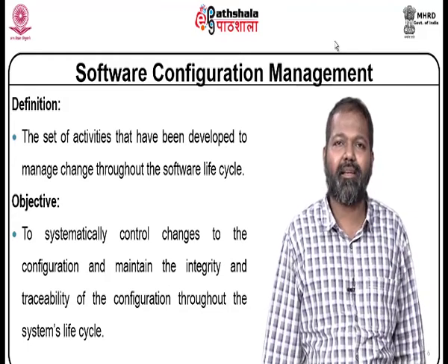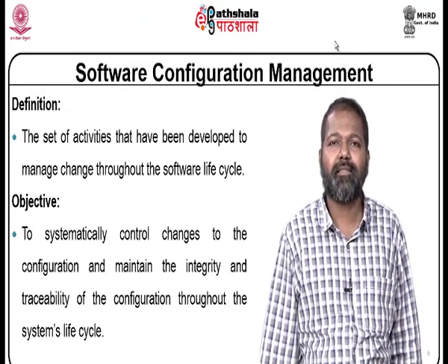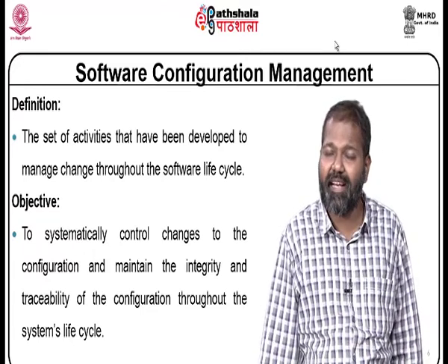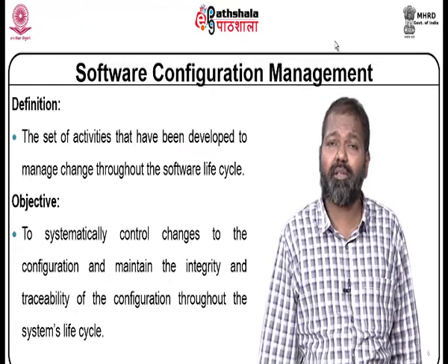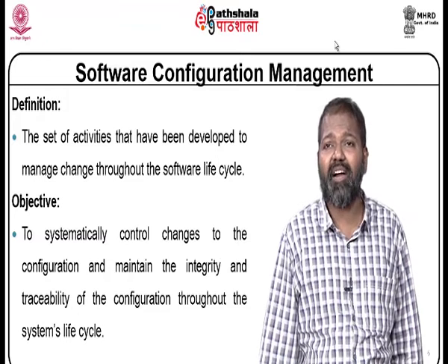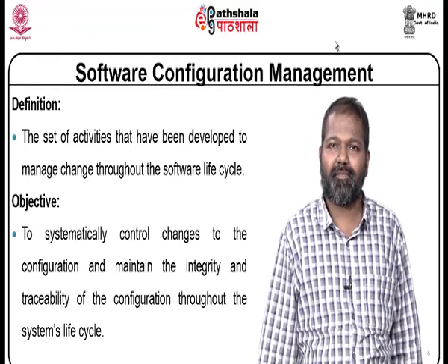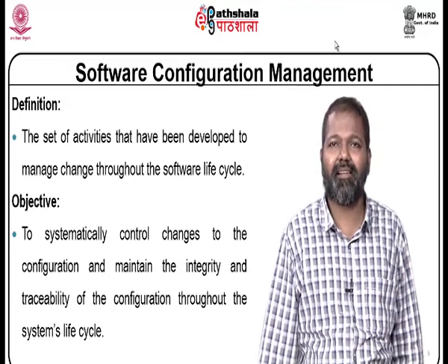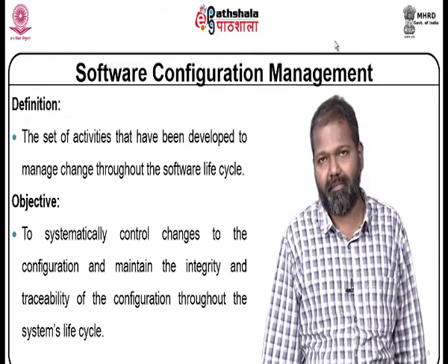Once testing is complete and the product is a quality assured software product, the product is deployed and the product enters the maintenance phase. During maintenance phase, as I have stated, business process re-engineering activities will be carried out, changing requirements will be addressed. As you move from one phase to another, if you want to address changing requirements, the cost increases.